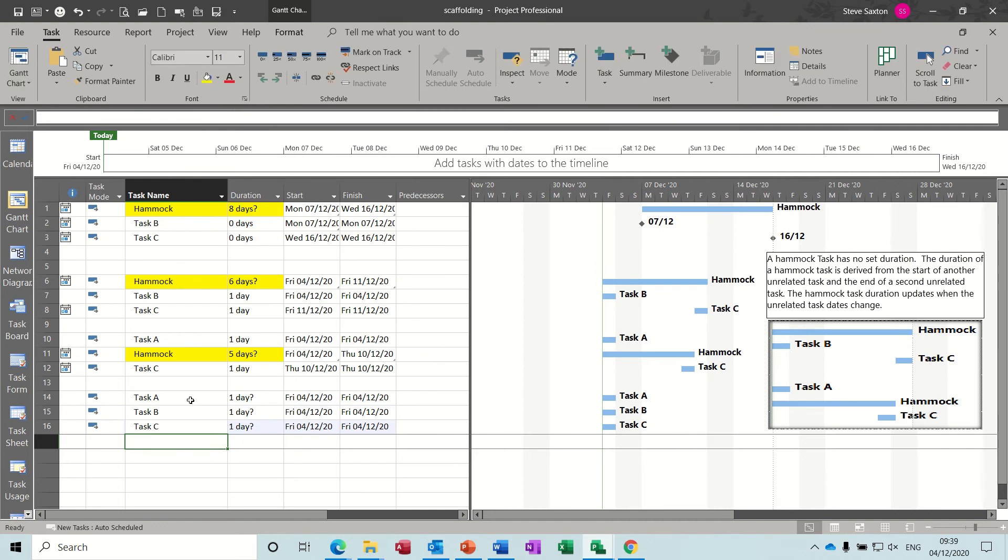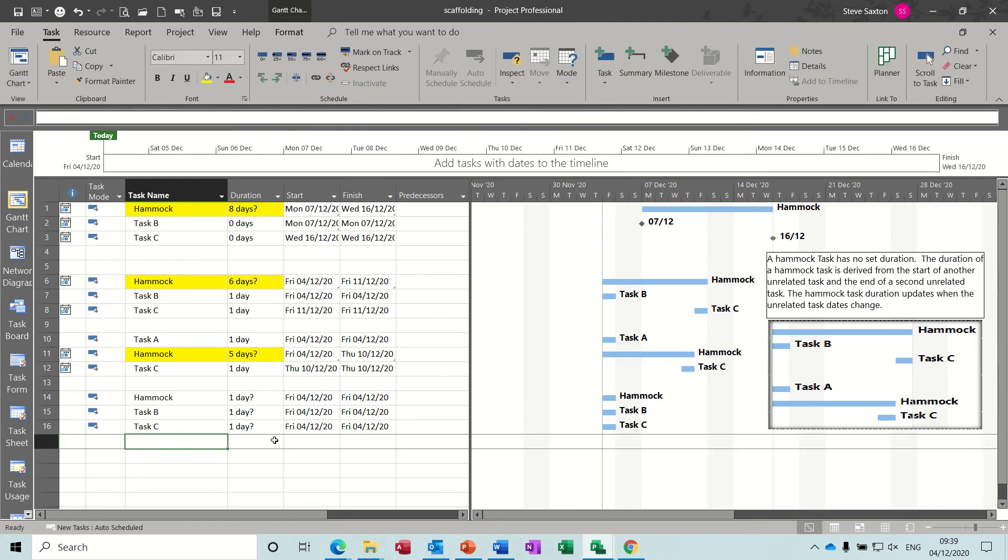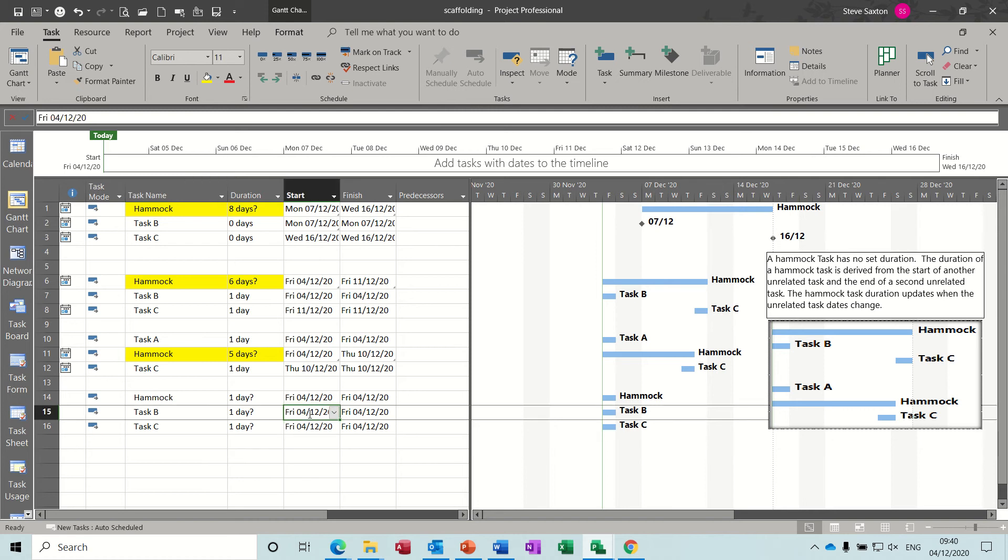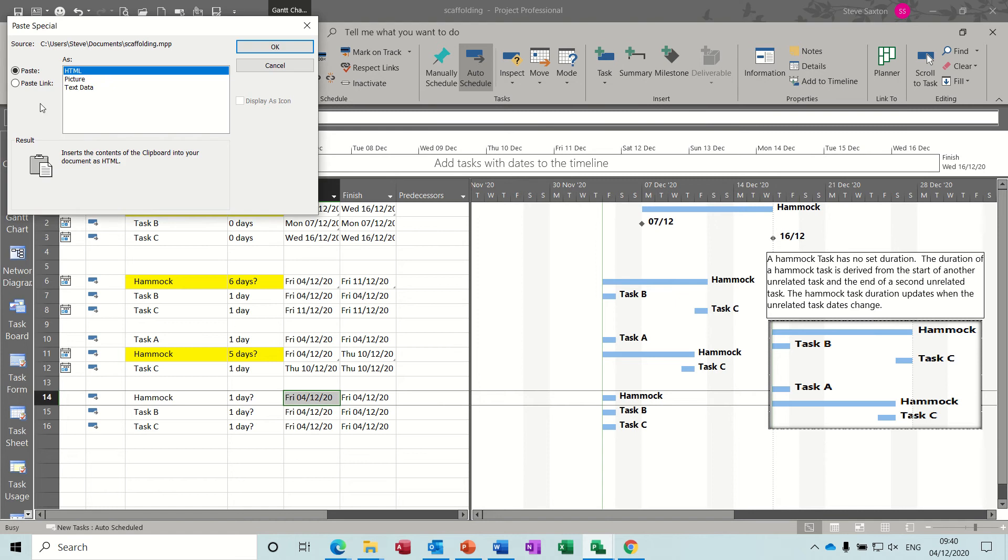So if I replicate these, if I just type my three sets of tasks: task A, task B, task C. So if I do the top option, I'll call that one hammock. So the start of the hammock is derived from the start of task B. So you click onto task B start, Control+C copy, and you click onto the hammock start.